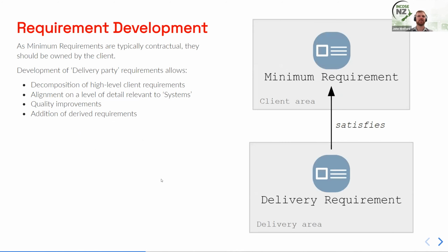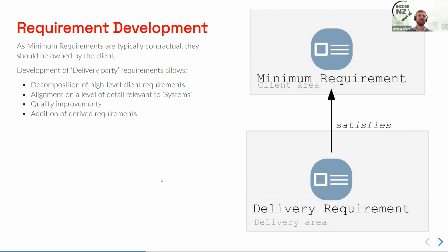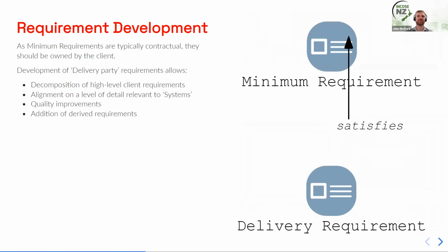I would expect that changes need to be made to the client requirements. So if we as iReX terminals design, or we as Link Alliance design delivery found that we couldn't meet a minimum requirement, we would raise a change request or a departure request against the minimum requirement.